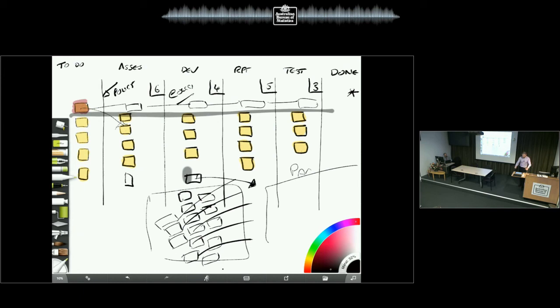If you have an external stakeholder where you have to pass over a card and wait for them to sign it off or approve it, or a decision to be made, and that's holding you up here, you could potentially have awaiting decisions. Now, one good thing to do is you could perhaps have them all here in a big parking lot. The problem there is you're just creating WIP, you're creating potential for defects, costs to go up.